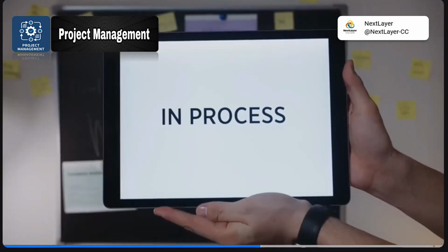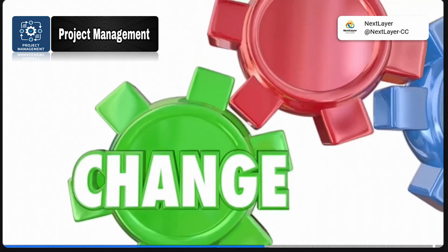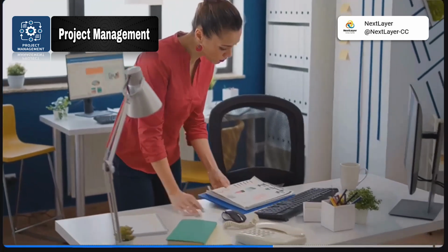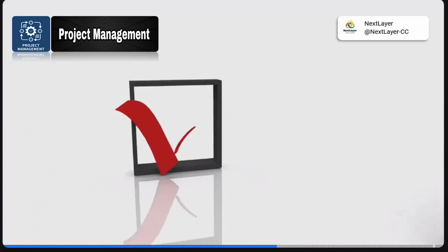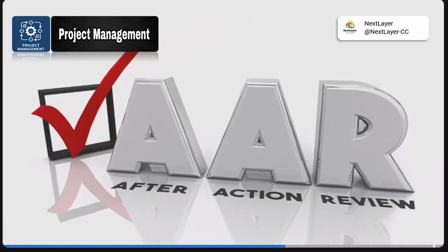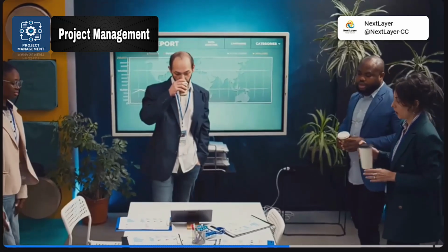Make sure to document everything. Keep records of all changes to the baseline plan, and write down what changed and why it was necessary. It's always better to document these changes so you can review them at the end of the project and learn from them. Keep everyone informed.